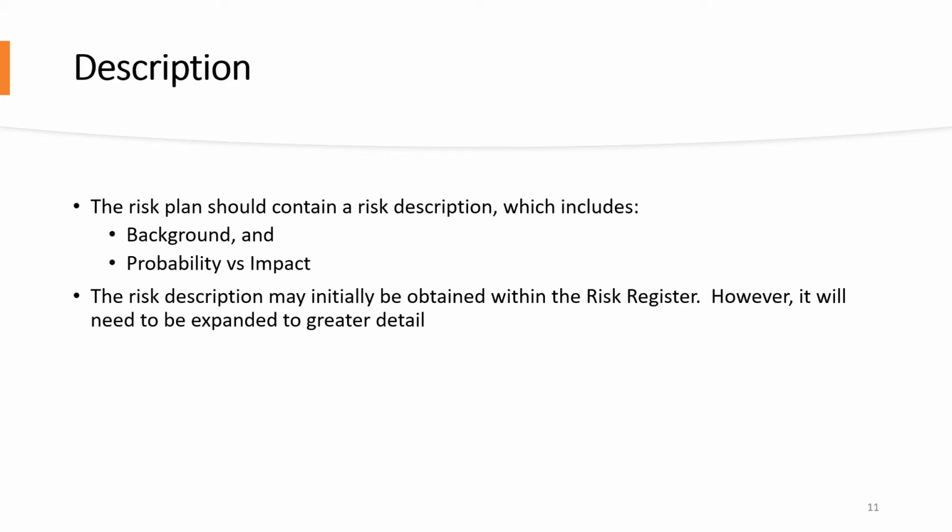For example, if we assess the probability of rain, if it is a clear and sunny day, doesn't this reduce its probability? Impact. If this risk comes into fruition, what will be the impact of this event? Will it impact the critical path and schedule? Will it impact the project cost? Will it impact the project scope? Will the risk lead to termination of the project, or even worse, unfavorable consequences for the organization? These are all factors to weigh into consideration.